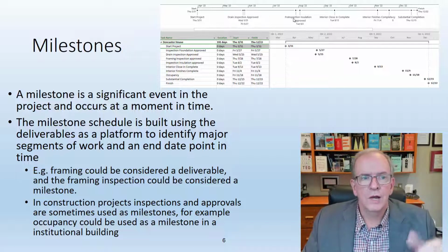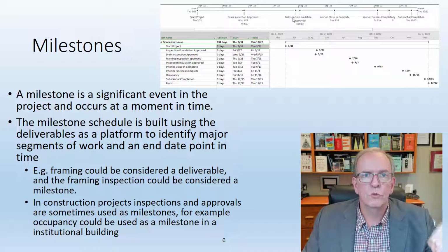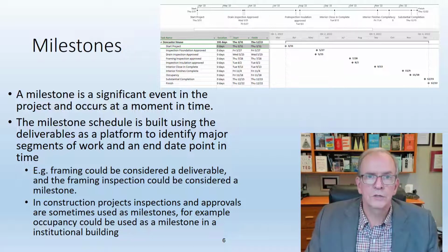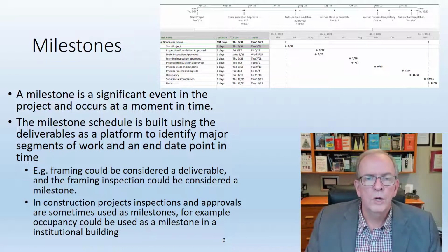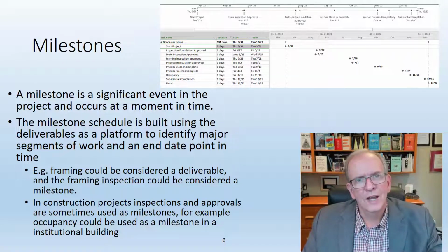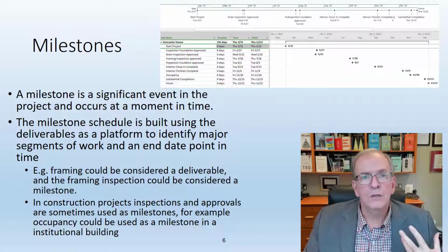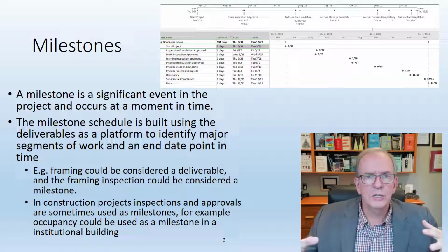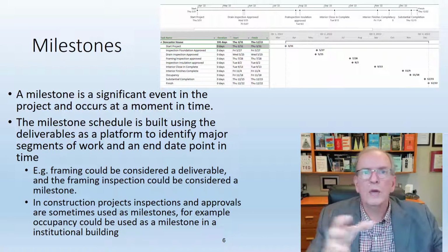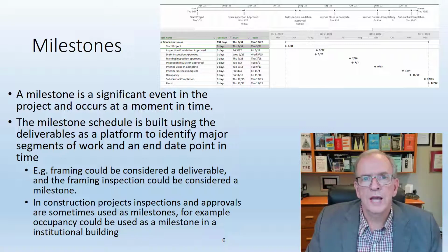And they're targets, and it also provides some clarity of vision where you want to be at certain points in time. And that's very, very helpful too, because then you can really break things down and go into much more detail. So this is a good starting point to have that clear, and it's a good way to go through with your client exactly what you expect to be happening at certain points in time, so they can start to prepare for it. They may also have to, if it's a renovation that's being done in offices or something like that, you might have key dates where they have to move or relocate for periods of time, and that would help establish those time factors and those time periods.